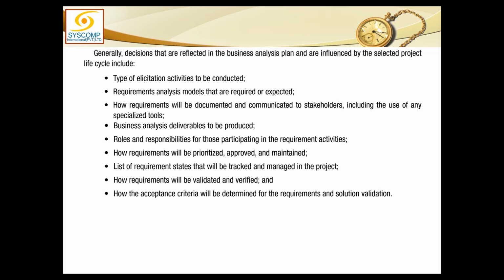Once those requirements have been collected, how do you order them, what is the mechanism of the approval process, and how will they be maintained in a database or in a filing system. The list of requirement states that will be tracked and managed in the project. The level of importance and how the tracking of those requirements will be done. Naturally, as you said, traceability metrics will be developed.